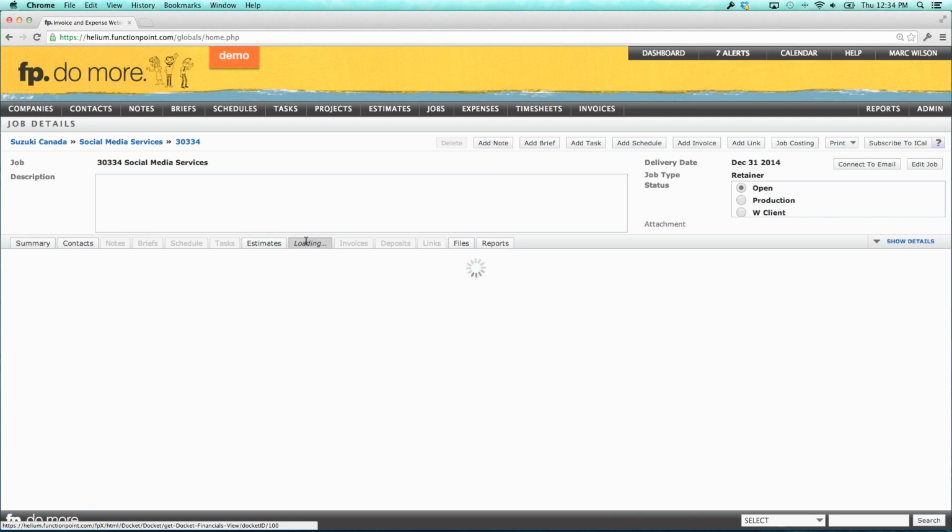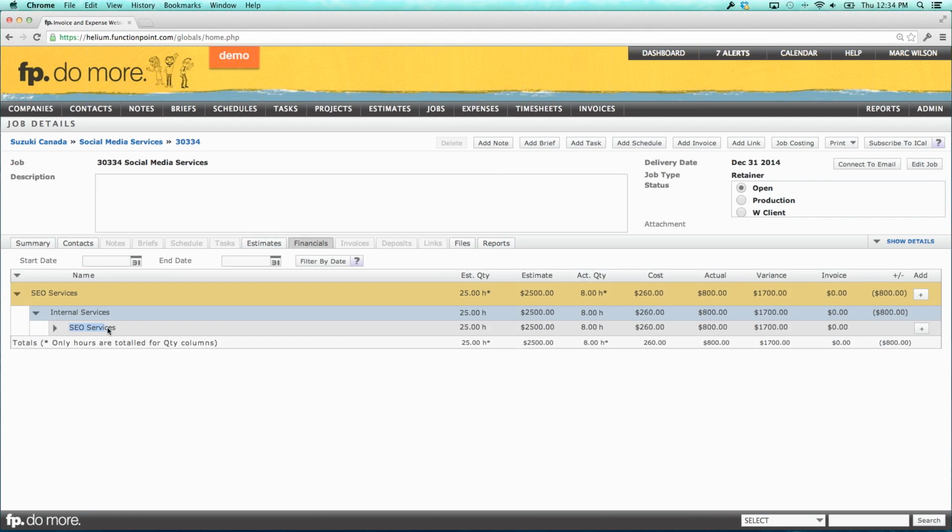Social media services consists of a single line item called SEO services, and I estimate about 25 hours per month that I'm going to be doing of this, and we're charging $100 an hour. So far this month, I've put in 8 hours, and that's at $800. We've used $800 of our $2,500 retainer, and we haven't invoiced anything.